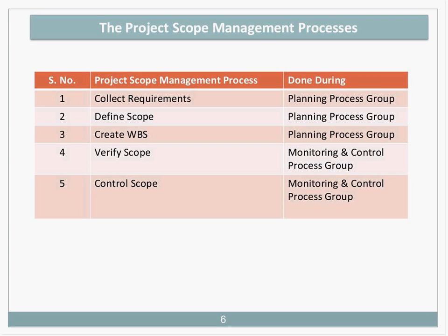Create WBS: dividing or decomposing the scope to the work package level and documenting it in the WBS and the WBS dictionary. Validate scope is reviewing or testing the project deliverables with the sponsor, obtaining acceptance and sign-off on the documentation. Control scope is controlling changes to the scope baseline, scope statement, WBS and WBS dictionary, through integrated change control, ensuring that all the work required and only the work required is included in the project.